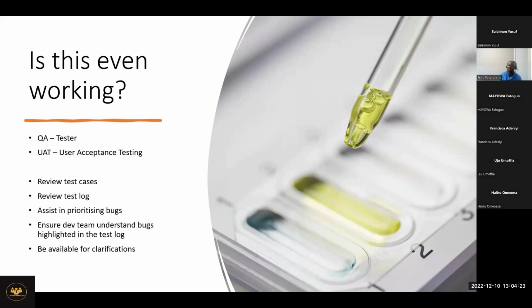What we need is a technology that can extract certain information from this document, maybe the title of the medical leave and the date, right? So when this person uploads this document, we need an OCR, optical character recognition. It's another thing entirely, but it's a technology that exists that can take out this information without exposing the outright documents to everybody. So now that you're in testing, we are analyzing these requirements, and we're asking ourselves, if we go ahead and launch this application, we might find ourselves with a $500 million fine for infringing on PI, personal information.